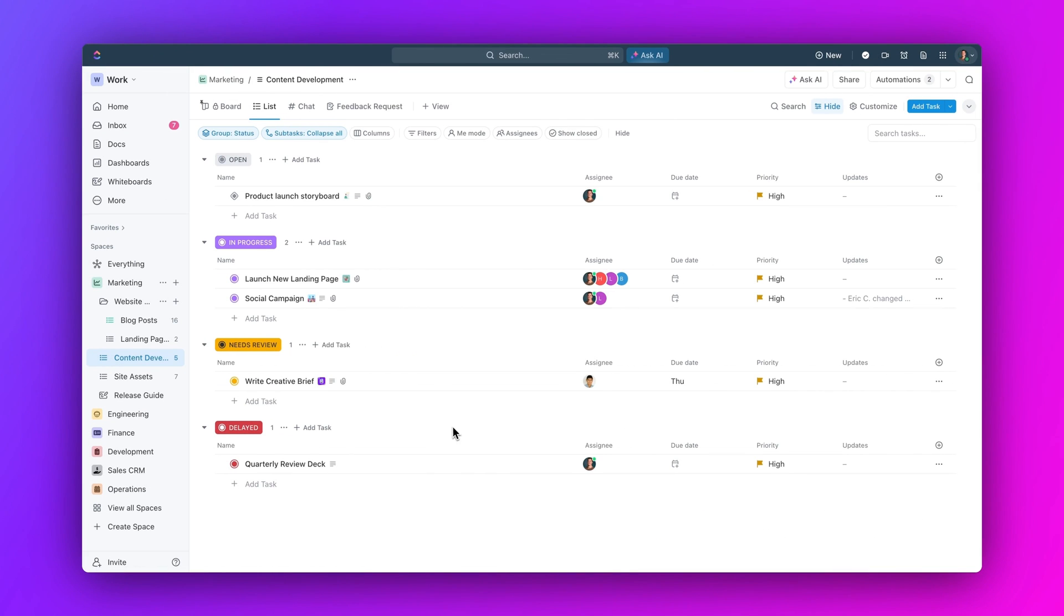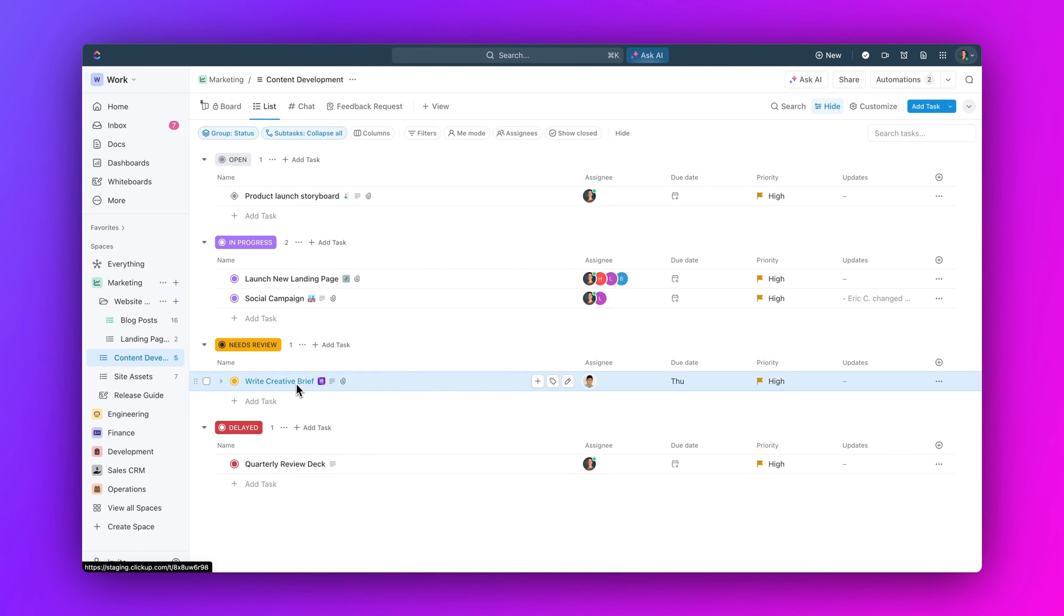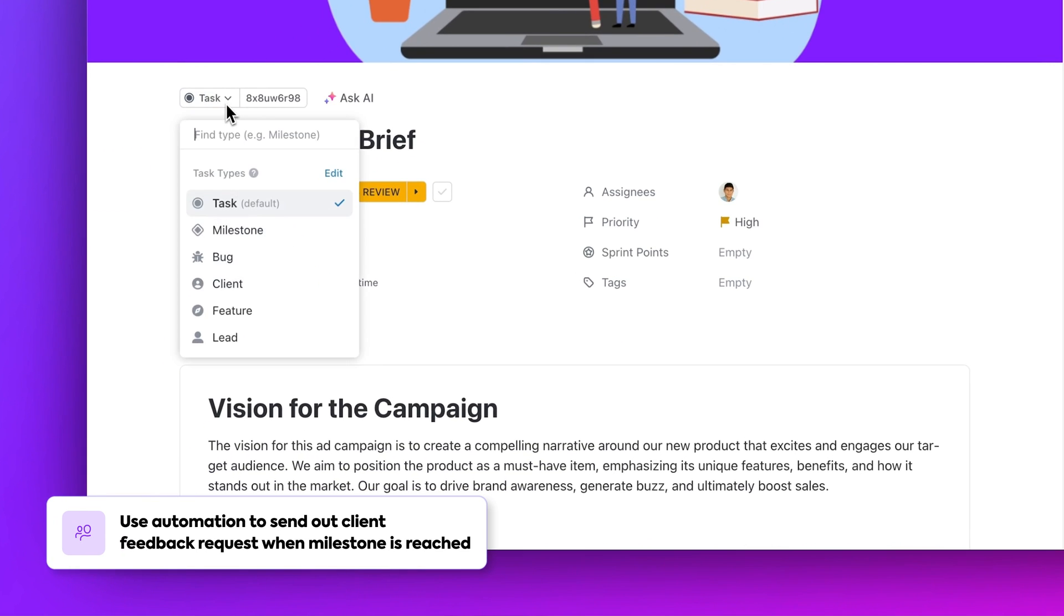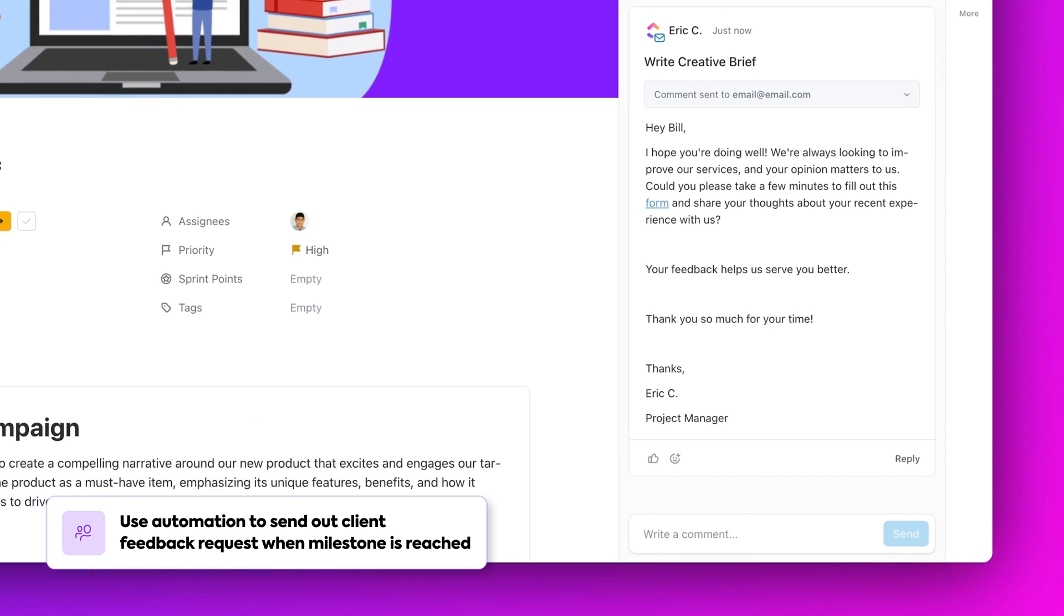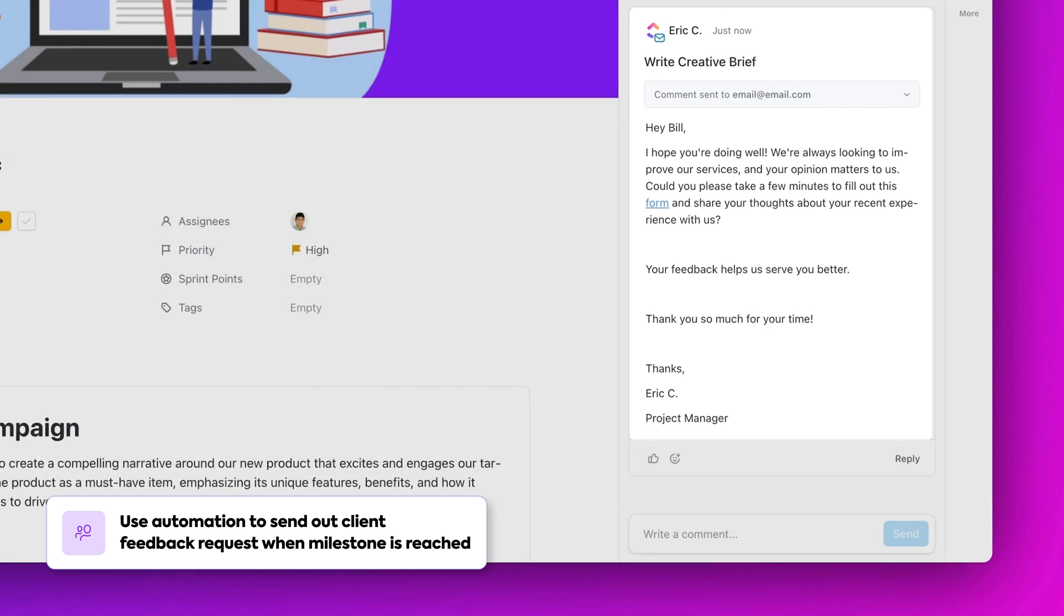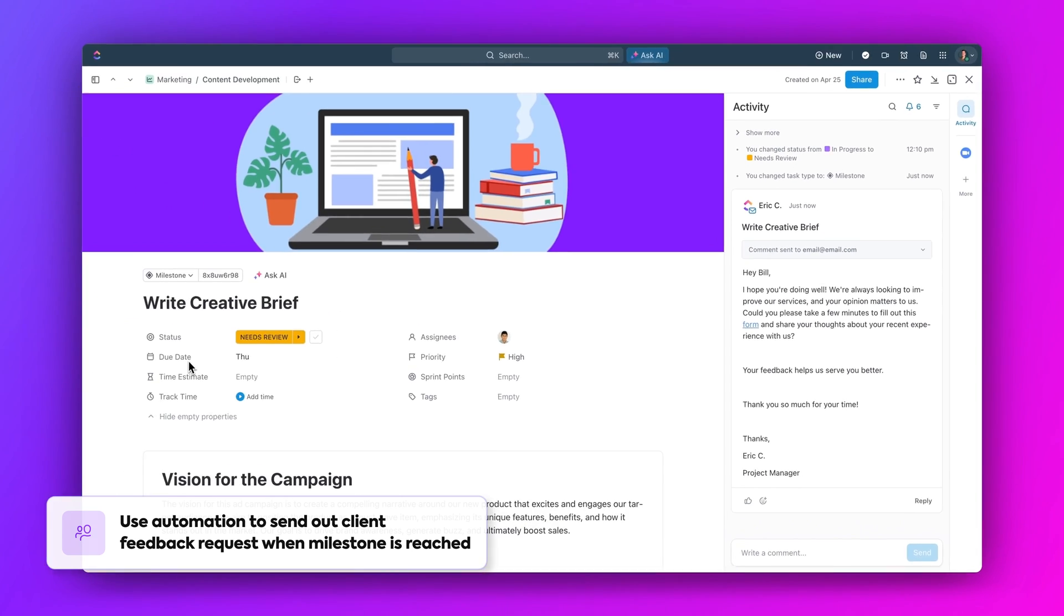You can even set up an automation so that when a project milestone is reached, a feedback request is automatically sent out to your clients, keeping them engaged and satisfied throughout the project.